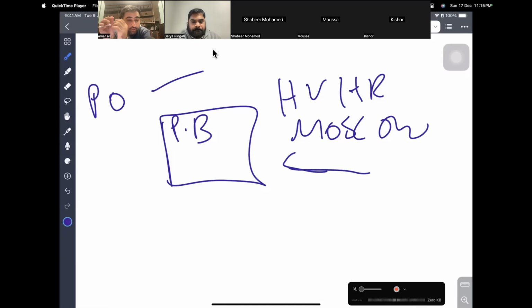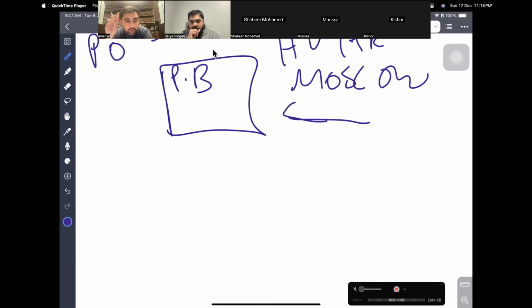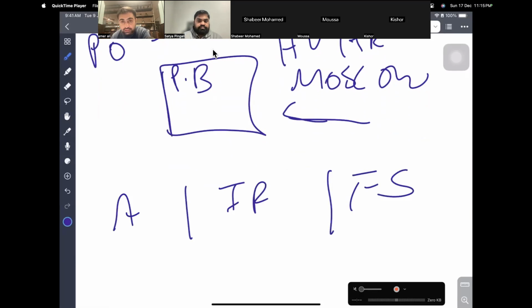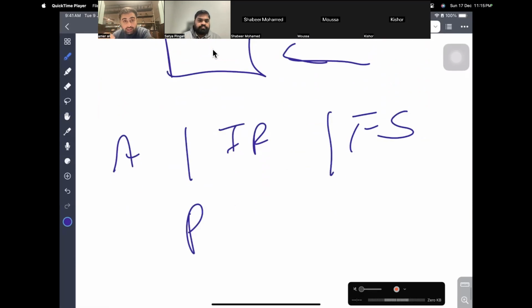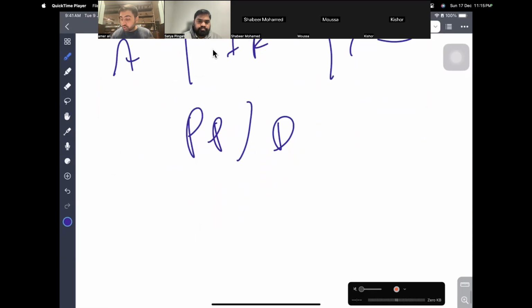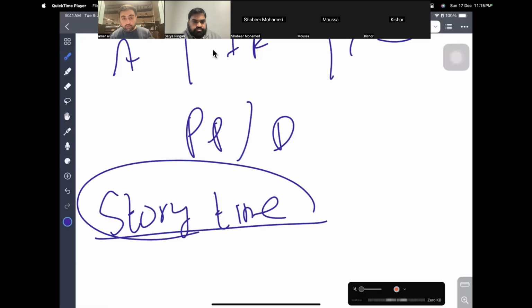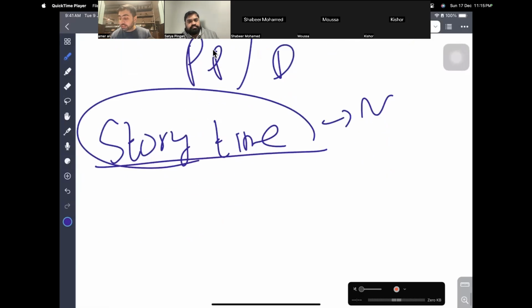Once they are prioritized, the team looks at what the high-risk things are. The team is responsible for calculating the effort of each user story. They will look at the product backlog and calculate the effort using affinity estimation, ideal days, or the Fibonacci series. We use planning poker for consensus building, and we can also use the Delphi technique to get anonymous consensus. Once we know the story points, which is the time or effort required for each user story, we estimate the velocity, which is the number of story points you complete in one sprint.